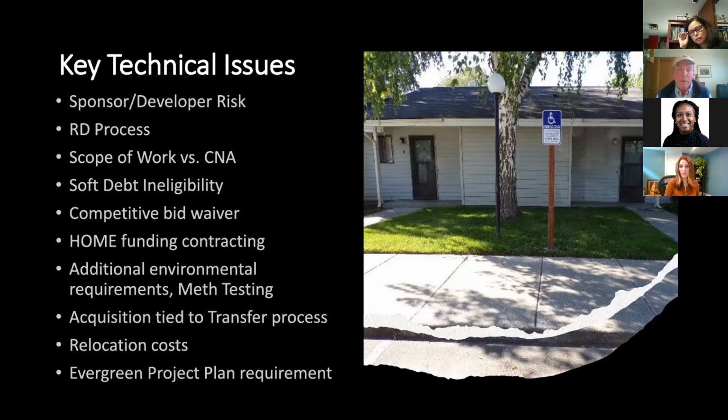Well, when you're 3 years down the line, what has occurred is, as each month goes by, more of the principal on the rural development mortgage loan gets amortized, which means you're not assuming as much debt in the acquisition, and you're having to consume more of the development funding we've obtained to pay the seller cash.